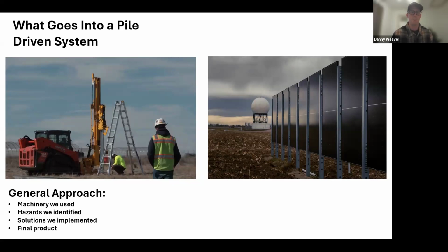So our focus was to keep using the same track over and over again and take very gradual turns. Definitely took a little bit longer, but we found it to be quite effective. And then the final product came out pretty satisfactory. As you saw in some of the earlier photos, there was already new growth underneath the array before the project was substantially complete.